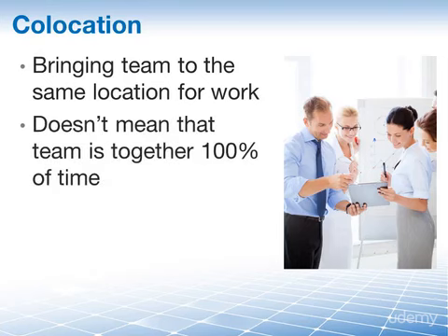But co-location doesn't have to mean that the team is co-located 100% of the time. In the situation where you have your 10 specialists all over the world, it may be advantageous to co-locate them for strategic milestones on the project, maybe for the kickoff meeting, and then again later on to discuss the project plan and so on. But the time that they can indeed spend together is of course dictated by the distance between them and also by the cost of bringing them together.